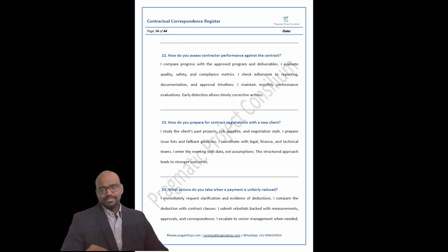People don't knock on your door unless it gets serious. So when a project manager enters your door, it means the claim is already in favor of the employer. So definitely stay in communication with them, and get the information from them before they bring it to your door. Keep a very close track of their performance in terms of time, and ensure that we are paying them properly. Have a discussion with finance, because if a contractor is not asking for a payment, you just can't keep not giving it.